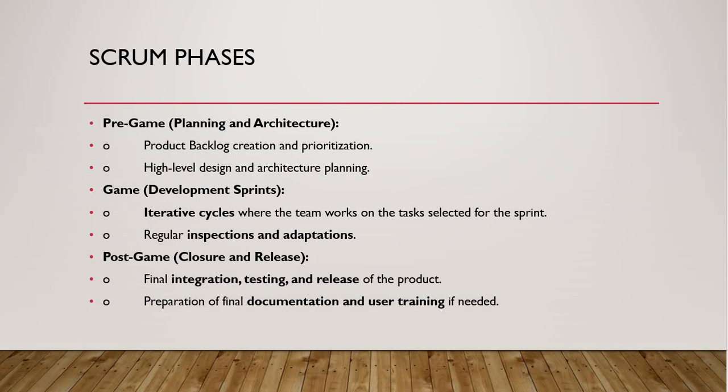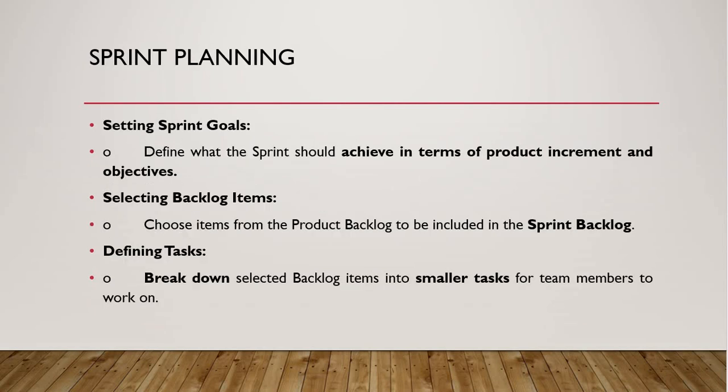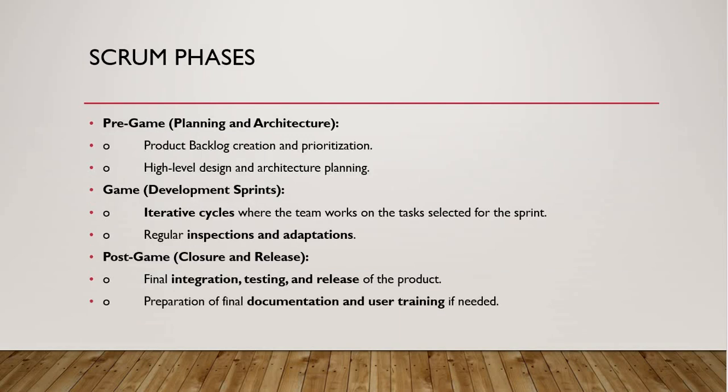This refers to the final integration. We are going to integrate all parts that have been done in all the sprints, testing, and release of the product, and then preparation of final documentation and user training if needed, such as user manual and so on. Okay, sprint planning. So this is the details of each